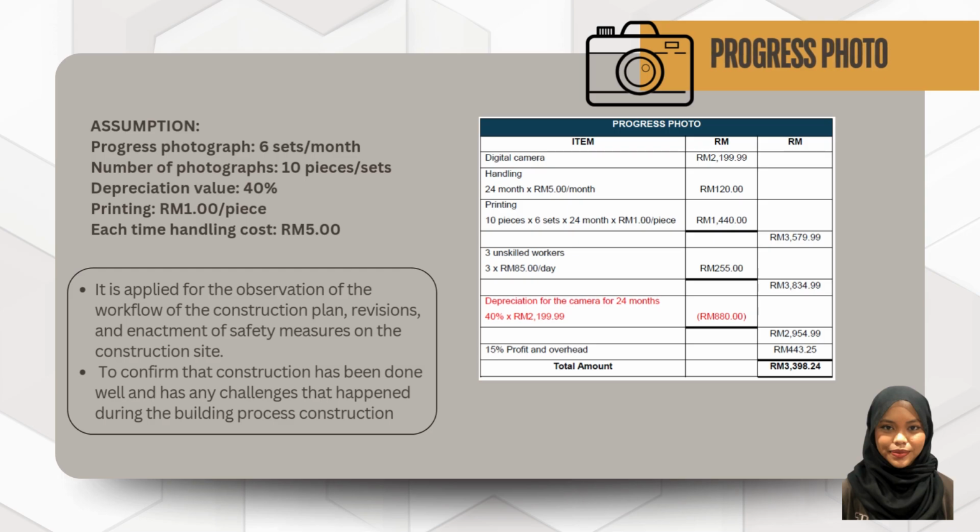When the construction project is suspected of causing harm to a neighboring party, pre-construction photo documentation offers proof of the state of the property before construction begins. This simple and low-cost documentation is often admissible in court and may be taken at set intervals during the construction process to show new conditions or lack of responsibility in case there is harm to the neighbor's property. Construction progress photograph may be used to record contractual completions, advertising images for promotional presentations in the media, or to demonstrate skills in bid proposal.